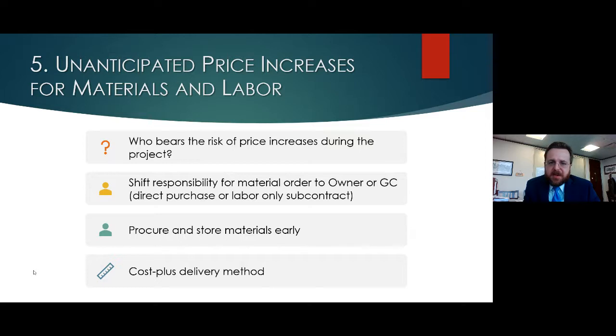This price is good if our work is performed during this period of time, starting on this date. And that way, if the overall project start or during the project it gets delayed and it pushes you back, you've got a better argument that any cost increases during that interim, you should not suffer.